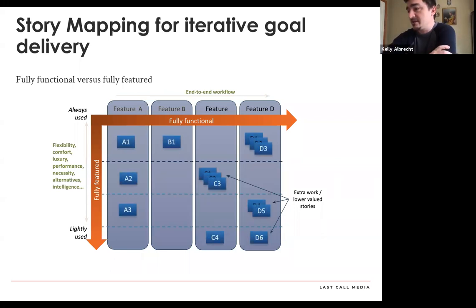And so if you prioritize the features within their feature set, then you can work iteratively across your end-to-end workflow. In this example, if you broke your big idea down into smaller user stories, A1, B1, and D1 through 3 could be your first iteration. And your second iteration could be some lower priority versions of A1 and C, and you can work through iteratively in that manner. It's considered an iteration because it has a little bit of every feature set.